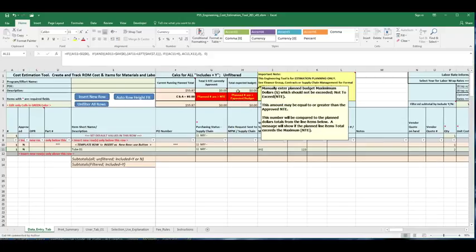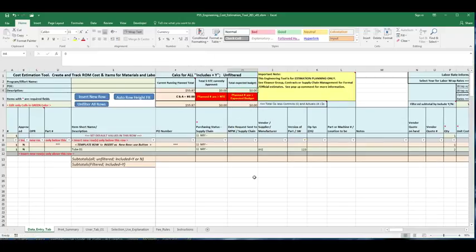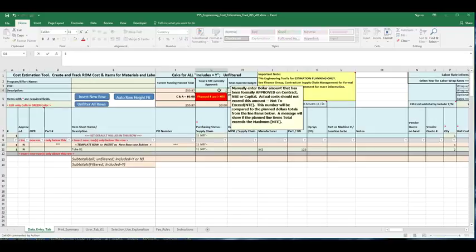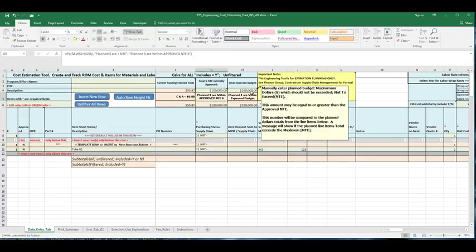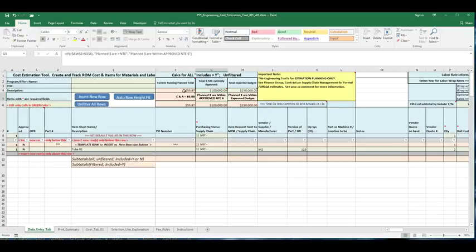Let's say our total potential value is 250K, but right now we're only funded for 100K, so I can enter those numbers in. If my current plan value, which is based on all the totals in this row, exceeds that number, it'll turn red, and give you a new color.